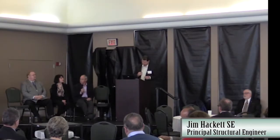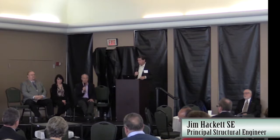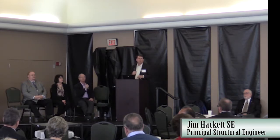Yeah, this topic, the rehabilitation triggers, are probably the bane of every structural engineer's existence out there who's ever done anything with DSA before. But the rehabilitation triggers are kind of important. The first really is that if you exceed 50% of the replacement value of a building that you're working on, that will in fact trigger our need to bring that building up to full compliance from a structural perspective. By bringing that up structurally, that will trigger accessibility requirements and certainly fire requirements as well. That's because of their rules, that's written into their regulations.